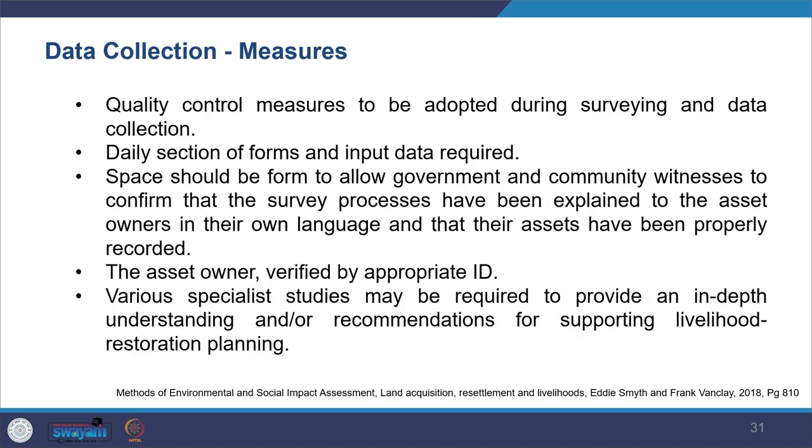And also you need to take care of the quality control measures during surveying and data, because you'll be collecting a lot of data, so how you're going to take care of the quality control. So who all will go for survey, how they have entered the data. So it is suggested that all the data should be checked on a daily basis in terms of input, and then also make provisions for explaining in local languages, and then also translations of those for the government entity and the local people. So you have to ensure that where you're recording, local people understand what data you're collecting from them.